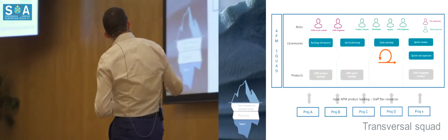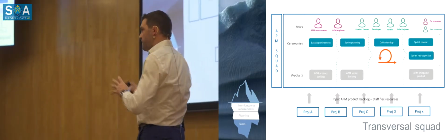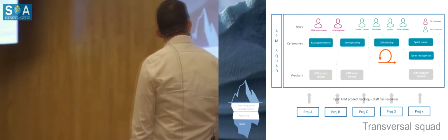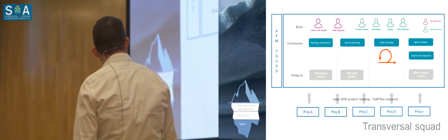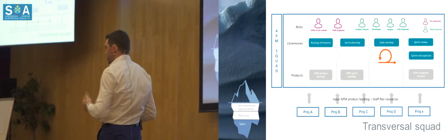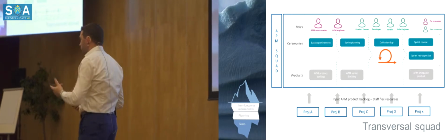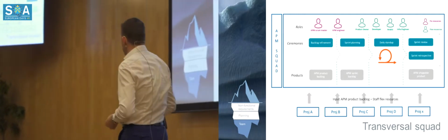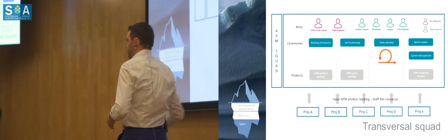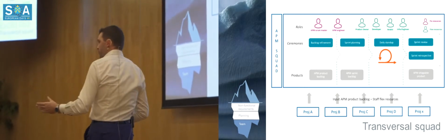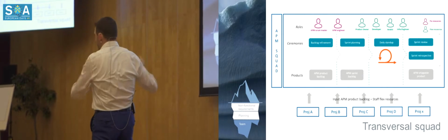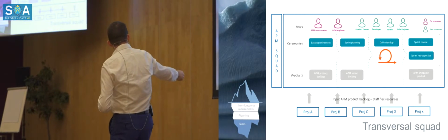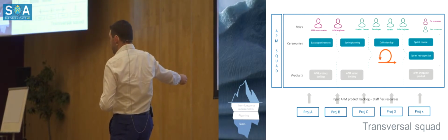Of course, they do a sprint planning, and maybe what is a little bit different than another squad is that the composition is flexible. Flexible in that way that you have fixed members, the Scrum Master and performance engineer. But the other people, they join the sprint based on the scope of the sprint planning. And in a Scrum of Scrum meeting, the Scrum Master of this squad can say, okay, now in the upcoming sprint, we will do performance testing for project A.